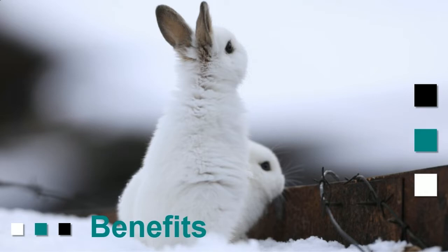If you're in more of a capital project situation, you might let your team do all their updates every Monday. And you might take a snapshot on a Wednesday to give them a day or two to get them in with a data date of the Monday. And then those automatically flow out to the reporting engine, the corporate reporting engine. Okay, so then you've got a controlled, structured approach, and your administrators or super users in P6 just work on exceptions.